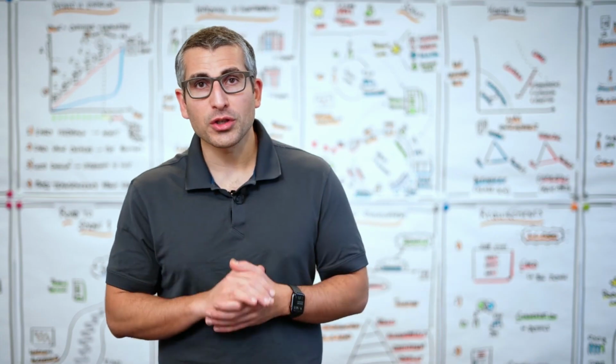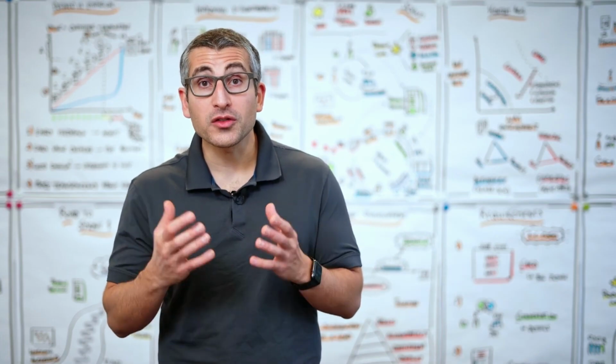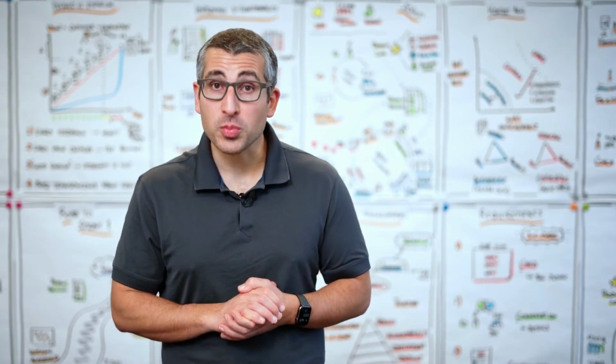Question number 1, what did we achieve yesterday with regards to our sprint goal? Question number 2, what are we going to work on today in order to achieve our sprint goal? And last but not least, question number 3, are there any impediments that keep us from achieving our sprint goal? If we do identify impediments, the intention is not to solve them right in the daily Scrum, but to take that impediment and discuss it afterwards with everyone that can help remove that impediment.